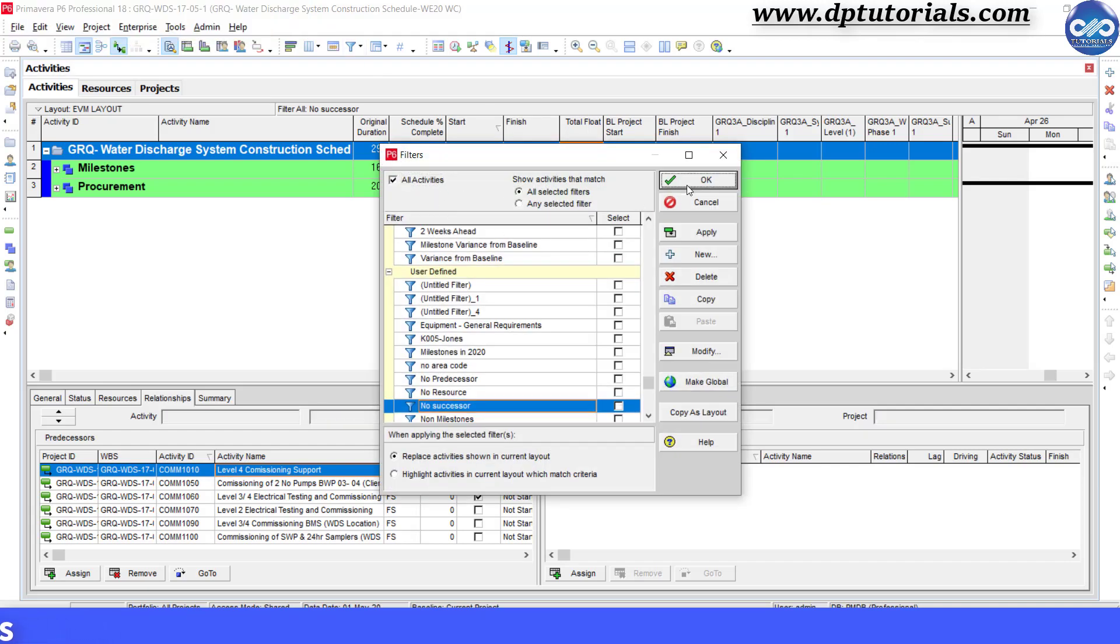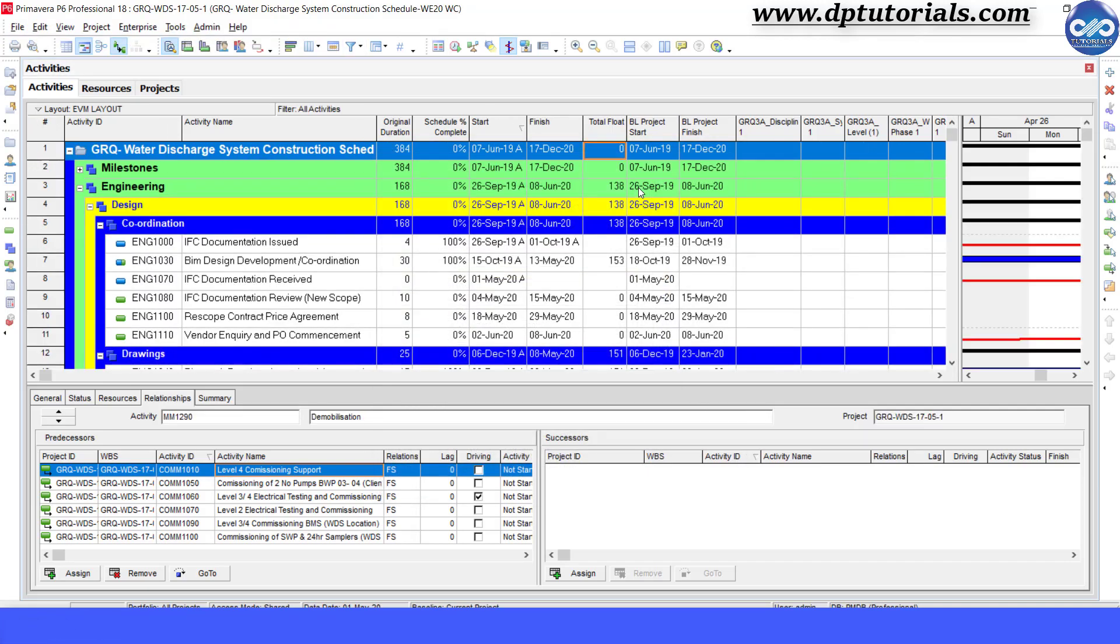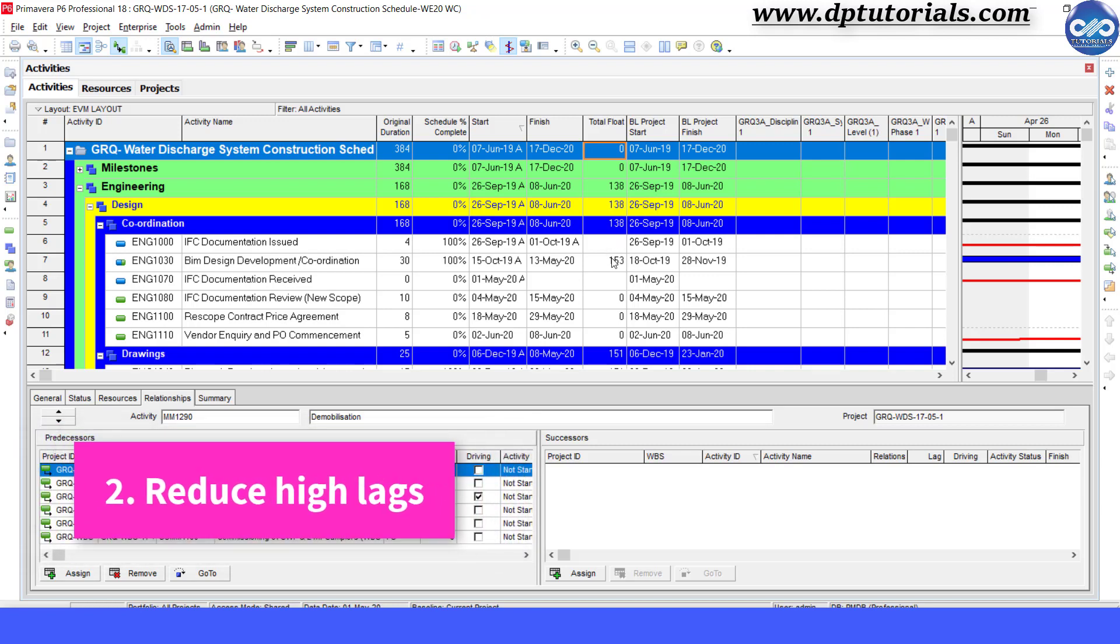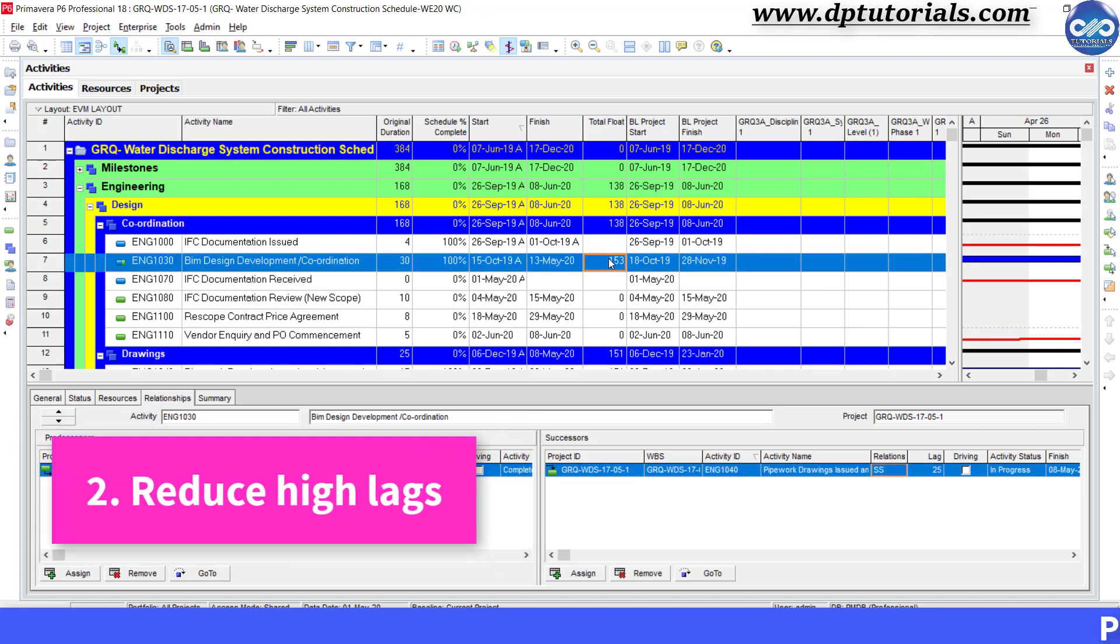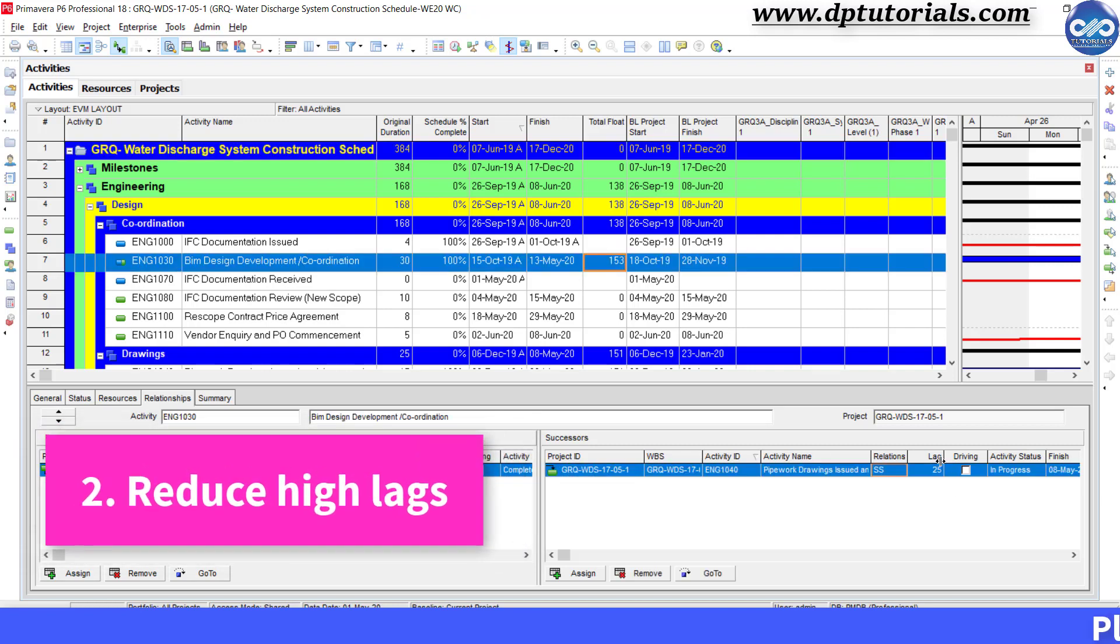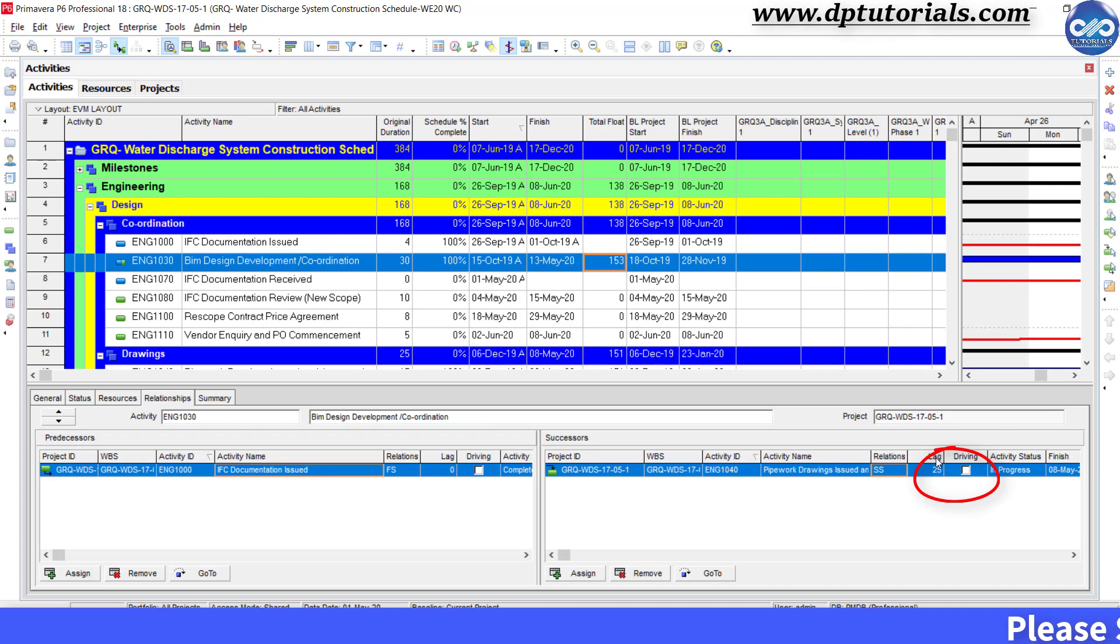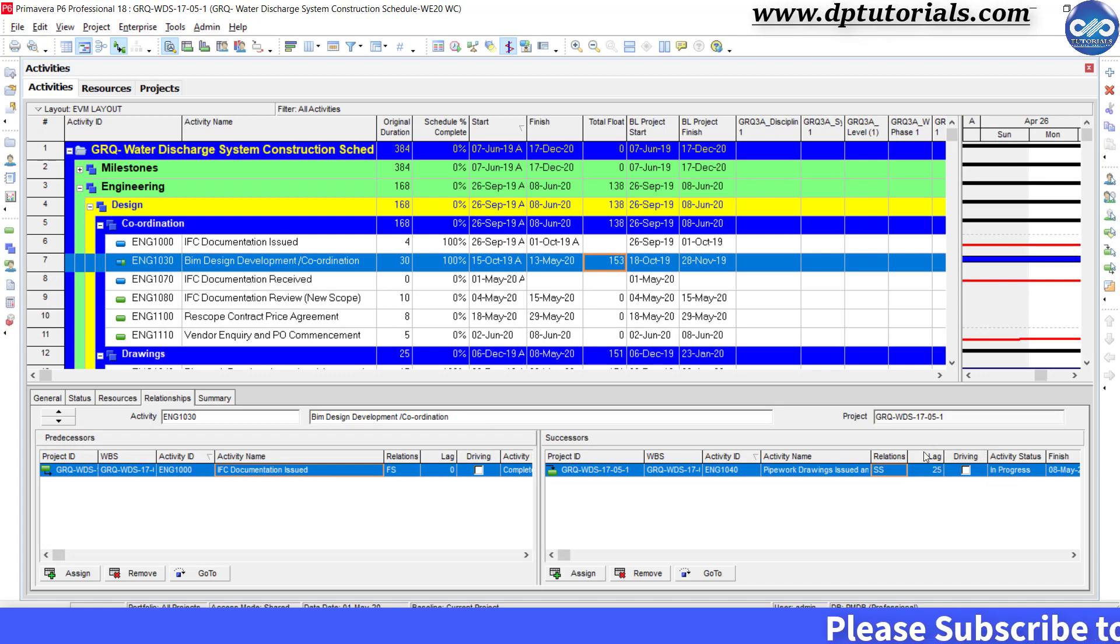Now, second best practice is reduce high lags. If required to add high lags, add more activities to describe in detail.